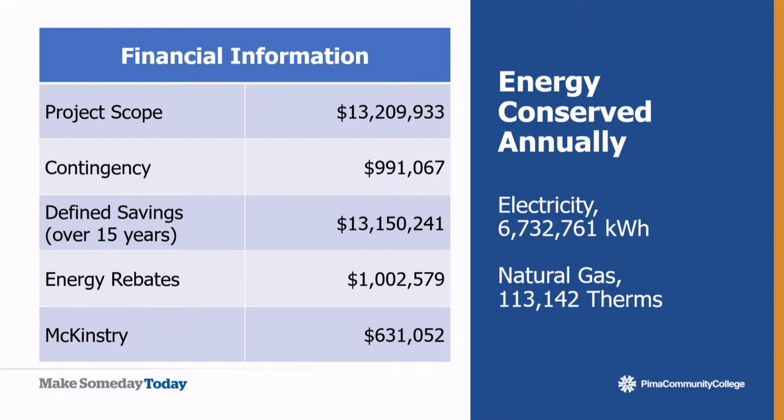Now, of the contingency amount, $791,747 has been utilized for project change orders. And as Benny had mentioned, they range from everything from repairing things that needed to be repaired in order to work with the systems to the integration of the new buildings that were coming along as well, so that everything had the common front end.